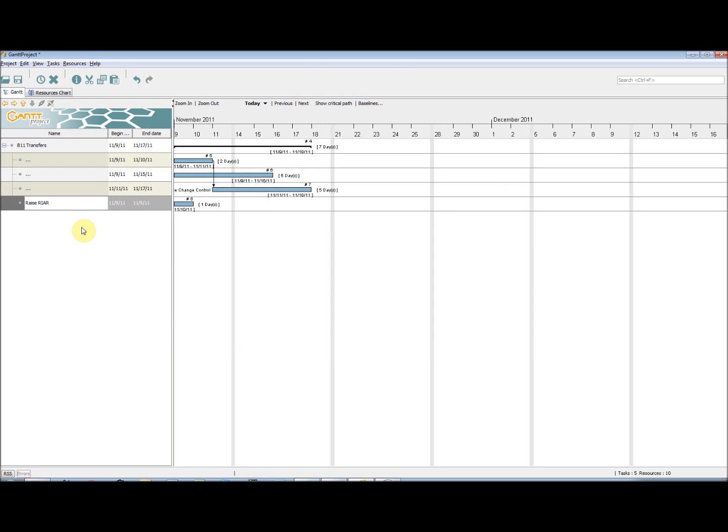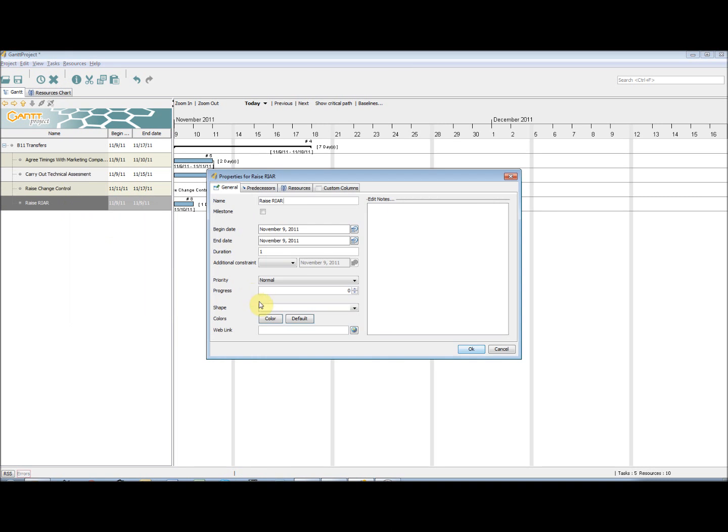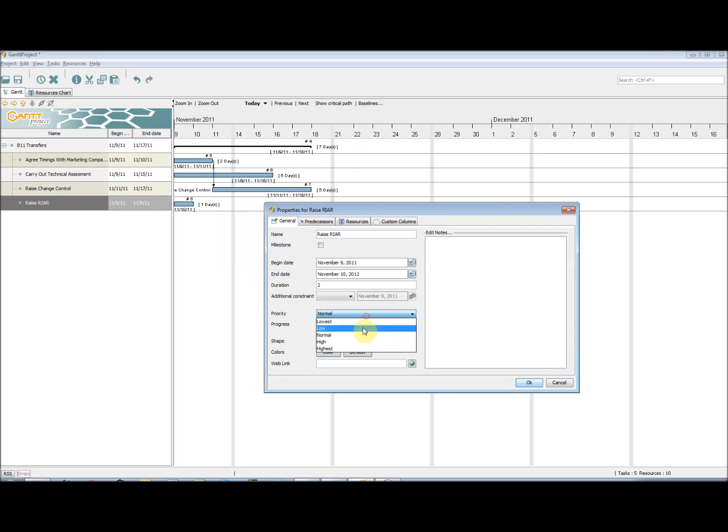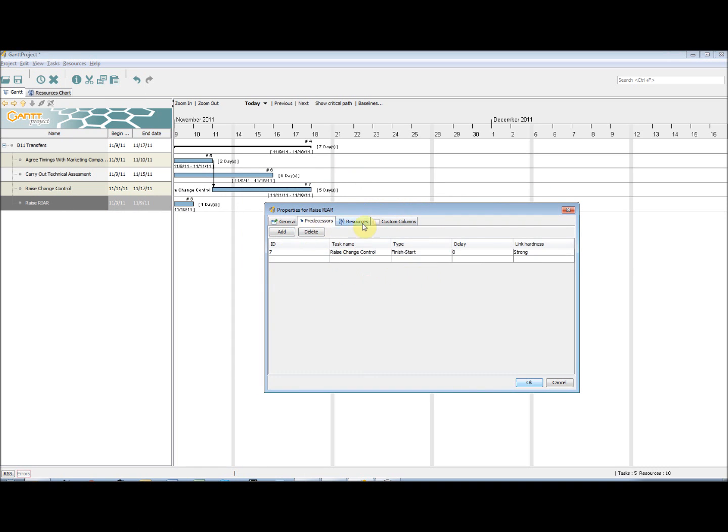Also note, when a predecessor is chosen, the task on the Gantt chart automatically moves and a link is created between them.